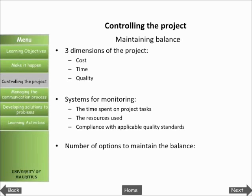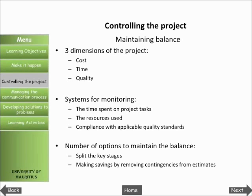There are a number of options for how you might take action to maintain this balance. These include: splitting the key stages to avoid each following another when there is no necessity to have one in place before the next; making savings by removing or reducing contingencies from estimates; and re-evaluating the dependencies in the logic diagram, as you may have been over-cautious in making the first judgments about the sequence of activities.